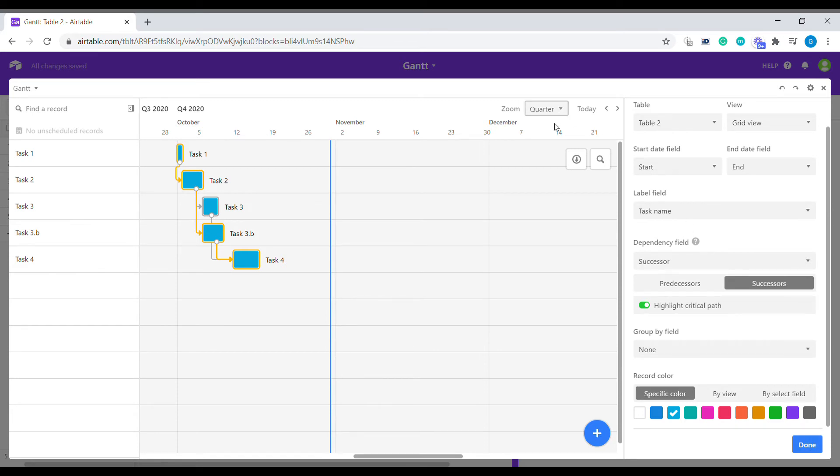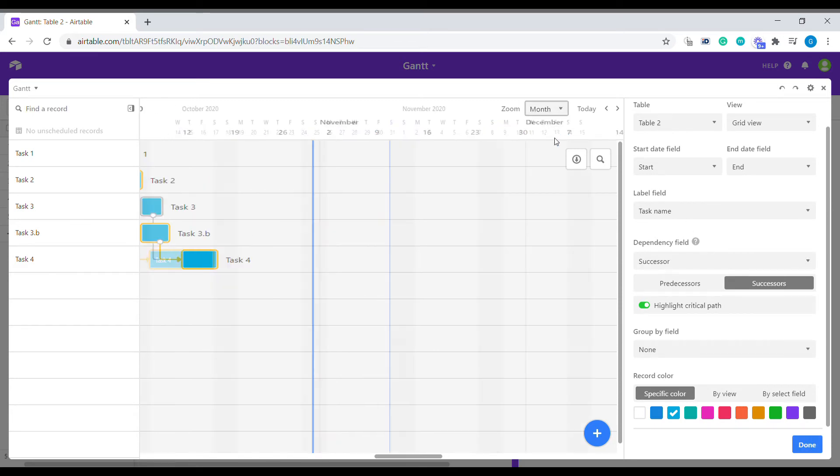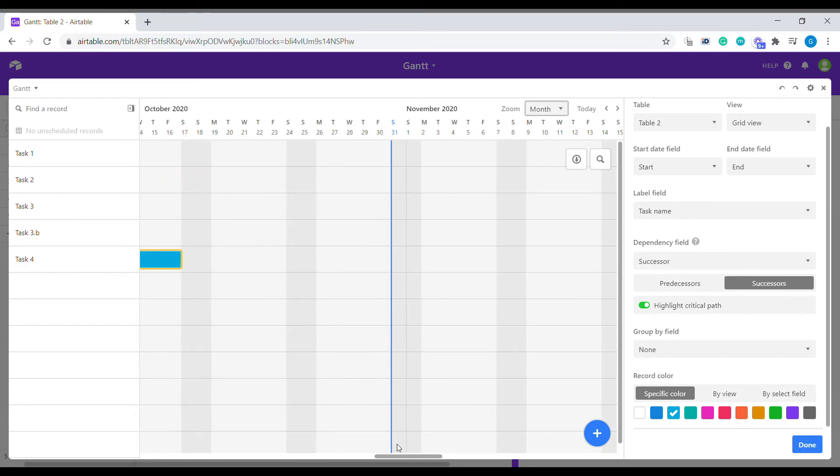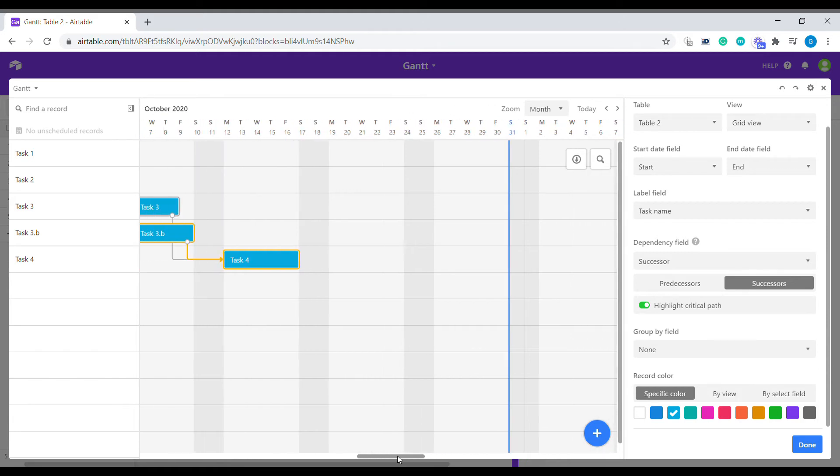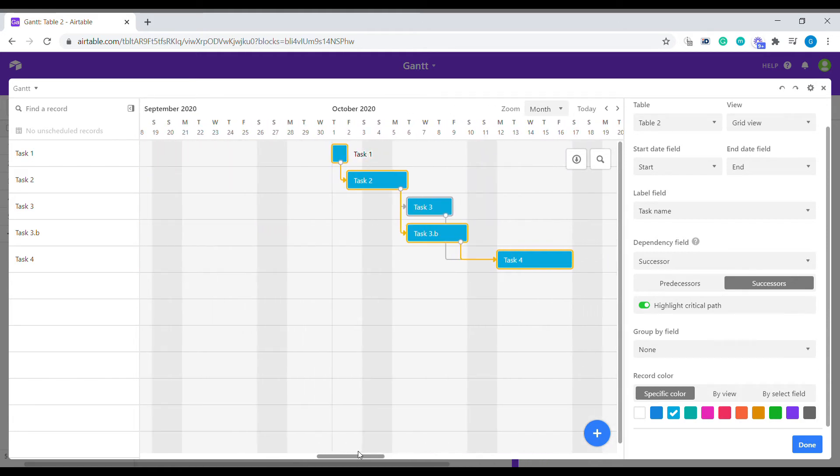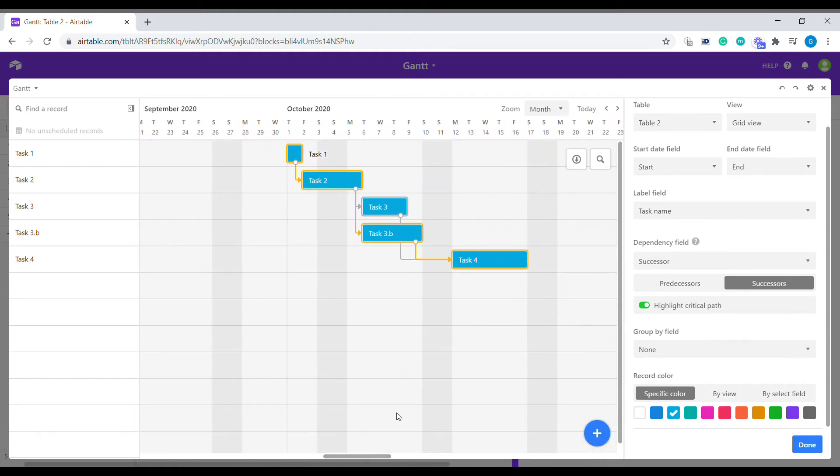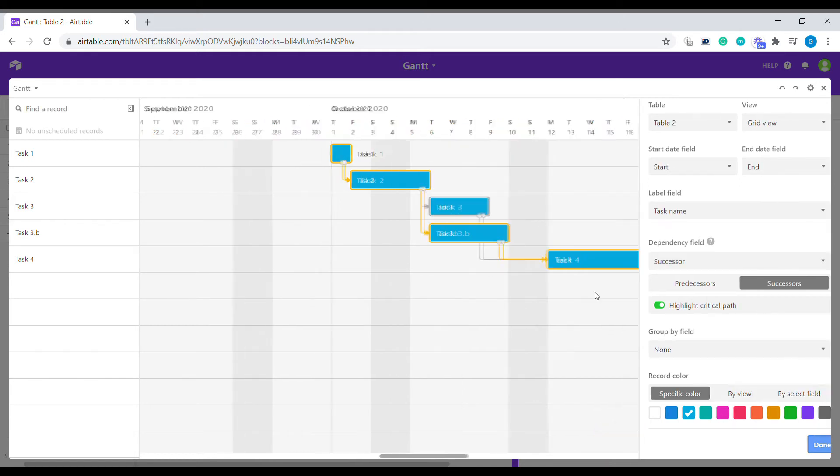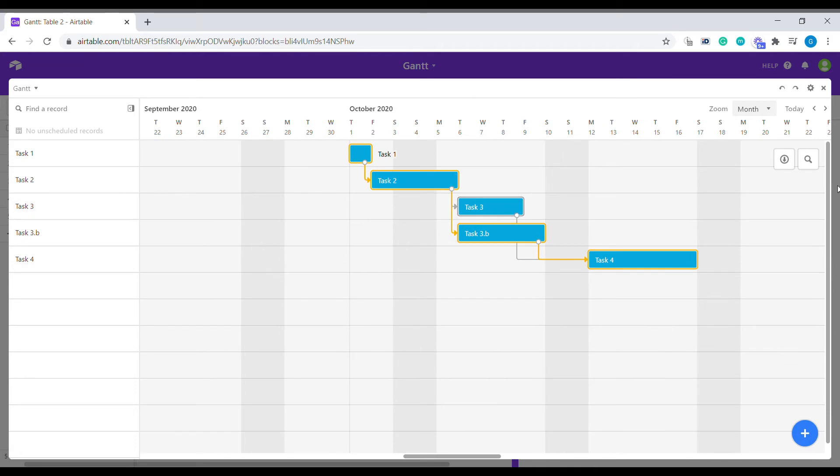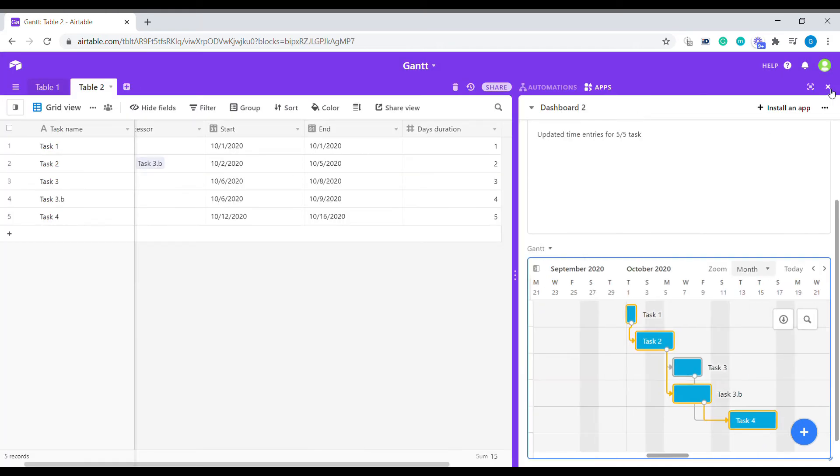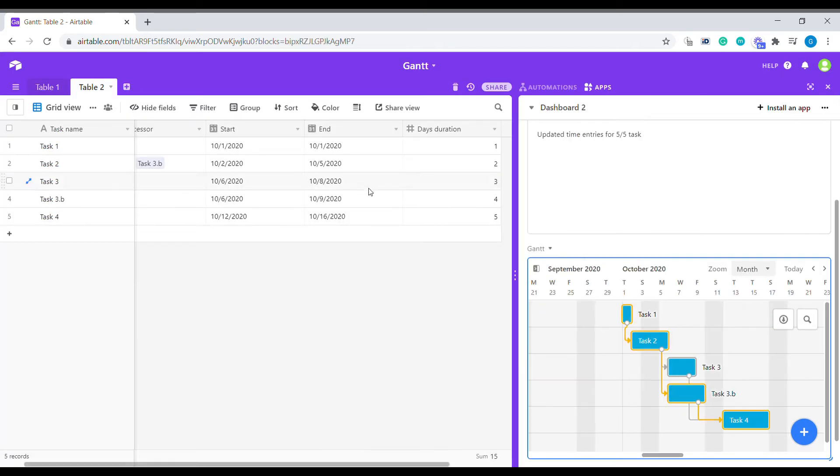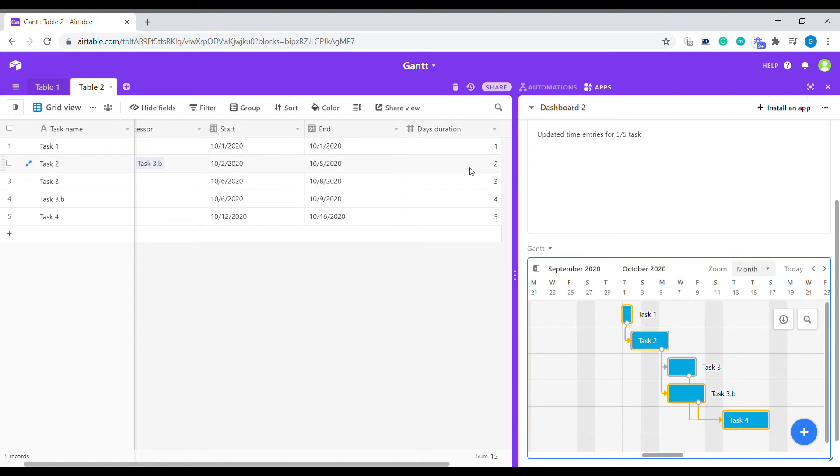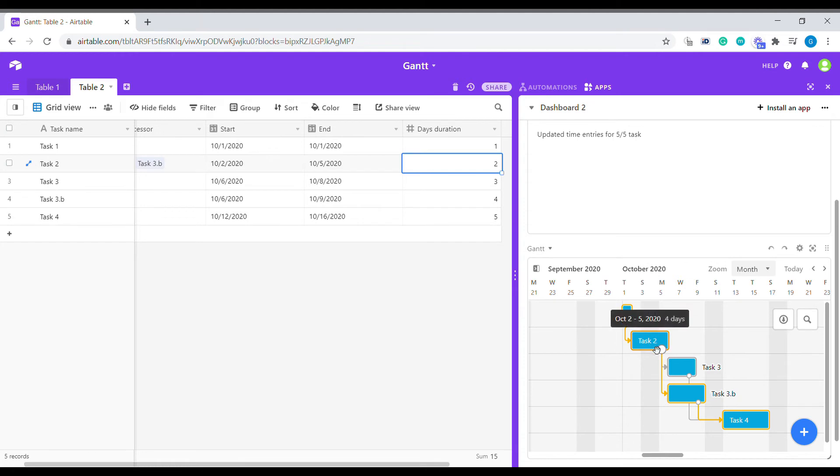But let's just change to a monthly view. And as you will notice on the monthly view, our script is avoiding weekends. So any weekends that are included here will not be included in the duration for the task that we are having. So you can see that, for example, task 2 consists actually of only two days. But because it's scheduled over the weekend, the script has extended the duration of the task for multiple days.